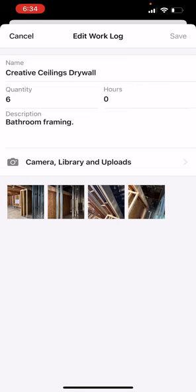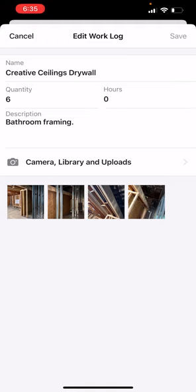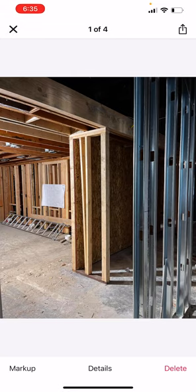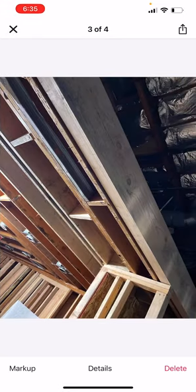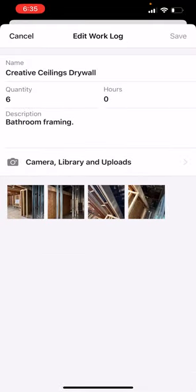So with Creative Ceilings, I had six people on site. Being that this isn't a GMP project, I don't have to really track hours. Now, if there was a reason where I had to track hours, then I would put that in and then it would count that for each individual that was on site. And then here, I can put in my description, certain things that they've done. Yesterday, they really focused just on the bathroom framing. So I did bathroom framing. And there's other notes and details that you can add into there. But one thing that I really like is you can upload and then take pictures from this app. Something that you see in Procore. But with Rakin, I just feel like it's done very seamlessly and it's just very easy to use.